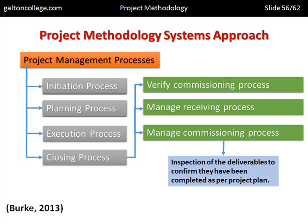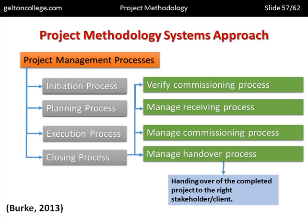Manage the commissioning process — inspection of the deliverables to confirm they have been completed as per the project plan. It's important that the original requirements are again consulted to make sure that what the project is delivering is what was required at the start. Manage the handover process — handing over of the completed project to the right stakeholder or client, ensuring it's understandable and comes with support, documentation, and training. There is a package of support handed over to the stakeholder who originally commissioned the project.